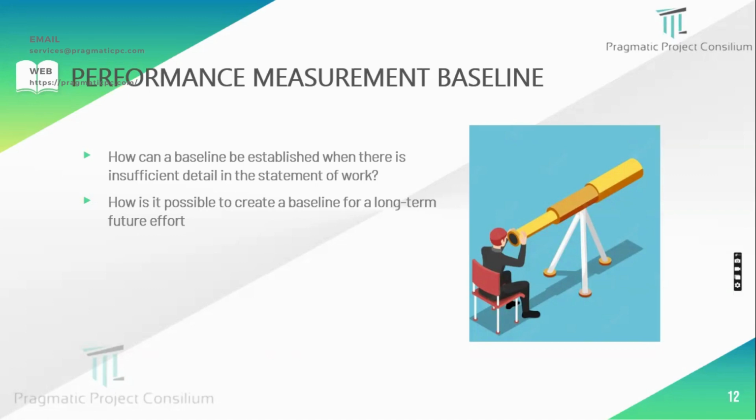When authorization for expenditure, the AFE, had been given for a 1-year project, we got the approval for spending. This approval took place in the first quarter, and we spent for that particular activity, but later noticed that the successor activity falls 9 months later. So we could have waited to complete that activity as per the physical requirement in the progress.